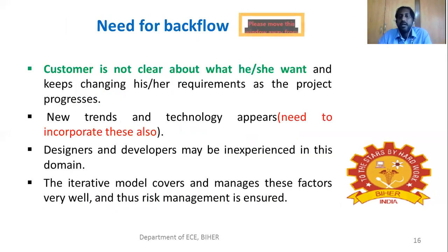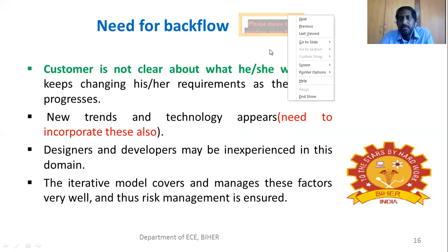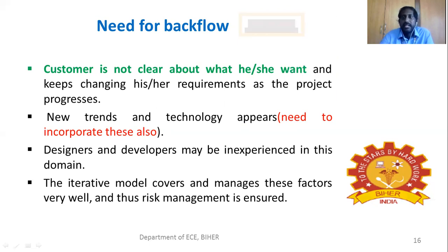What's the need for backflow? Why we go for backflow is important. The customer is not clear about the requirements, what he or she wants, and keeps changing the requirements as the project is in progress. The customer modifies the requirements during the implementation. Then we go for a backflow.